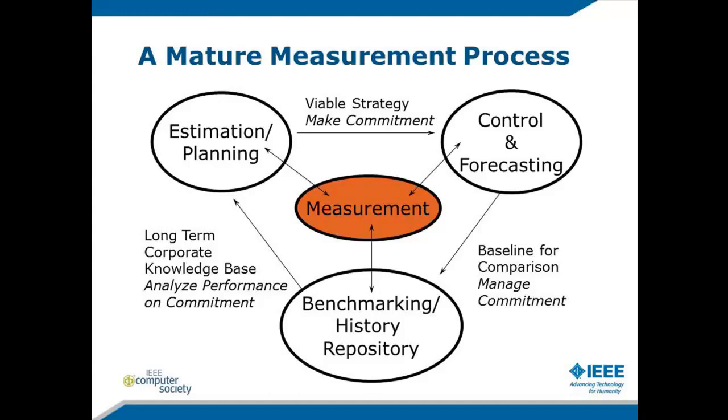Now, most people that start on these programs don't have a lot of history, but that's the end goal. We want to start pulling together some data on projects that have been completed. We're going to use that information when we go to run our estimates. We're going to leverage the size, duration, and effort information so that we can do a better job of predicting the future. Those early estimates will start with a scope level estimate, and then we'll hopefully refine the estimates as we get more information on the project that we're about to begin.